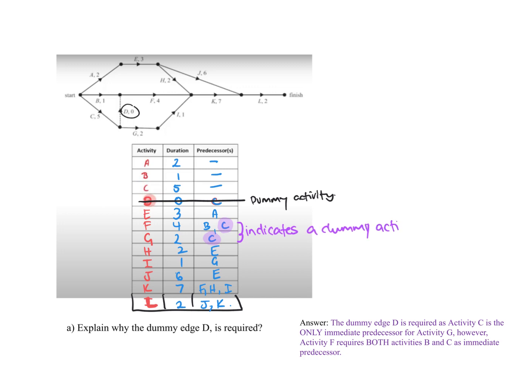To explain why edge D is required: the dummy activity edge D is required because activity C is the only immediate predecessor for activity G. Because G only has C, it can't be connected to anything else directly, but we also need C to happen before F — so we need a dummy activity there.